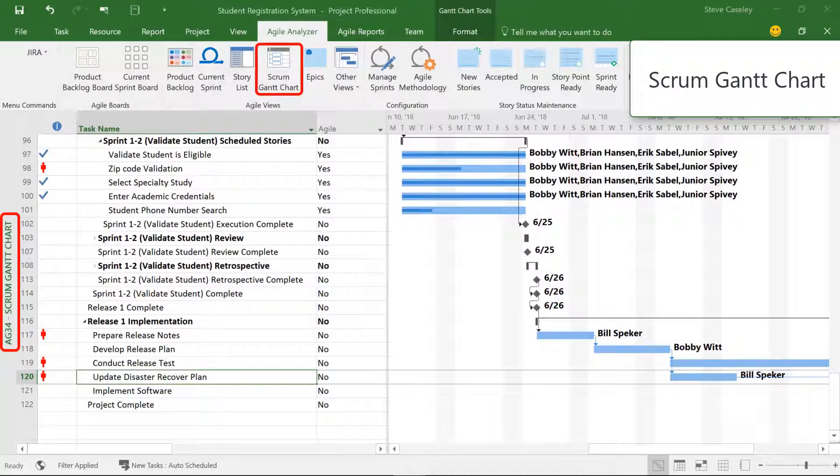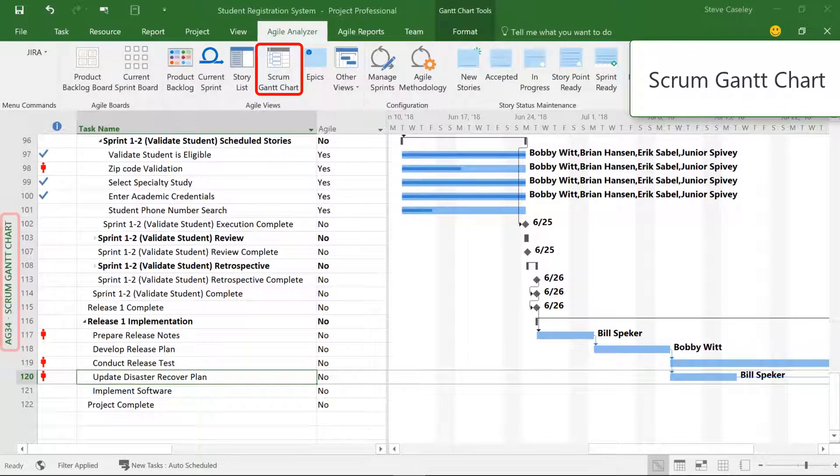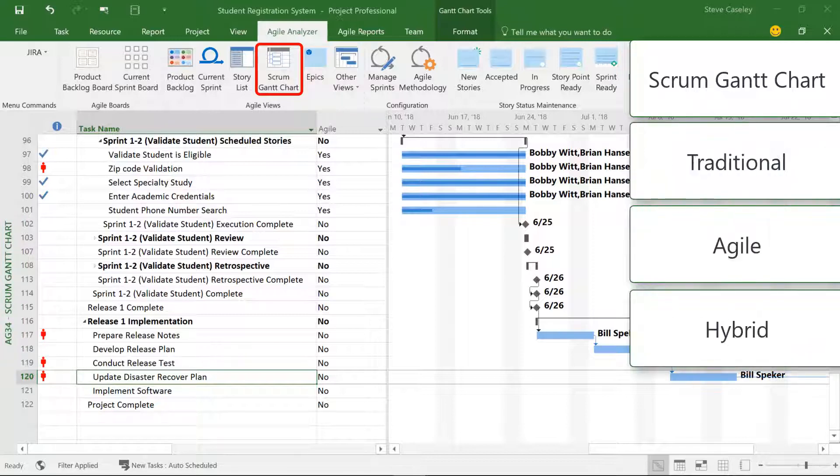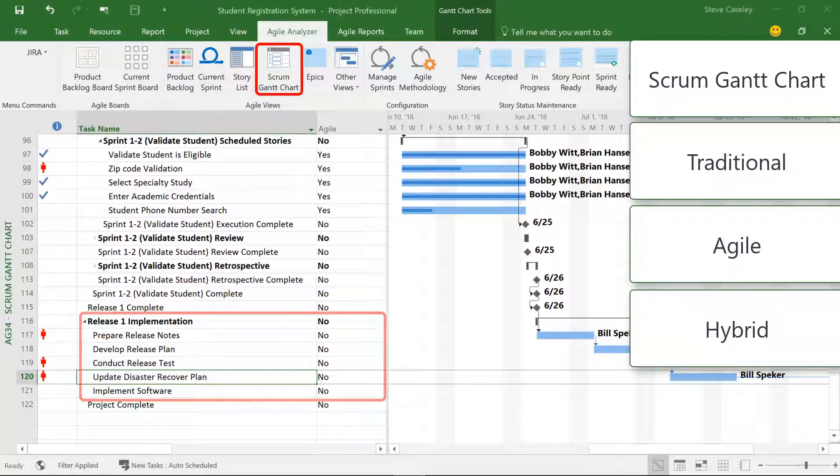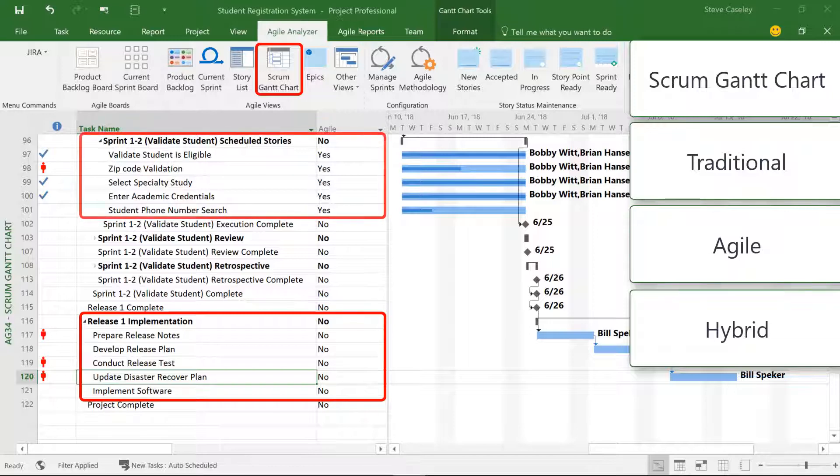The Scrum Gantt chart allows us to use the full functionality of Microsoft Project to manage any additional work that is not defined by a story. When running a hybrid project, we can manage the more traditional work portions with effort-based, dependency-driven tasks in parallel with fixed-duration stories in defined iterations.